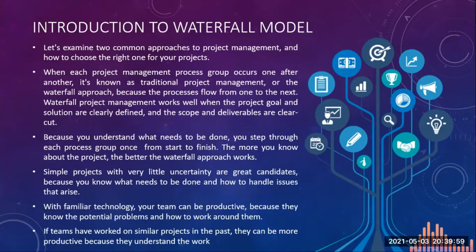Introduction to waterfall model. Let's examine two common approaches to project management and how to choose the right one for your projects. When each project management process occurs one after another, it is known as traditional project management or the waterfall approach. Because the process flows from one to the next, waterfall project management works well when the project goal and solutions are clearly defined and the scope and deliverables are clear cut. Because you understand what needs to be done, you step through each process group once from start to finish. The more you know about the project, the better the waterfall approach works.